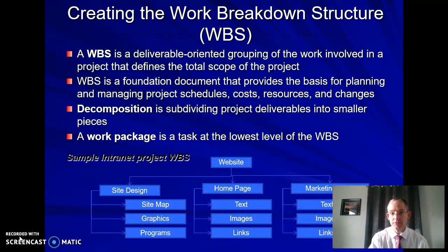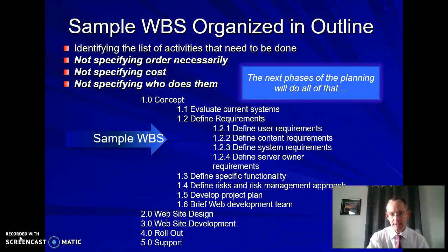The WBS that we'll be referring to throughout the project, it's basically taking all those different elements of the scope and breaking them down into pieces, organizing them. Because once we organize all the pieces that have to get done, we can start assigning those as work packages. Then once you can assign those as work packages, you can start to schedule them out, integrate them, and start to see what it's going to cost and how that all is going to fall together.